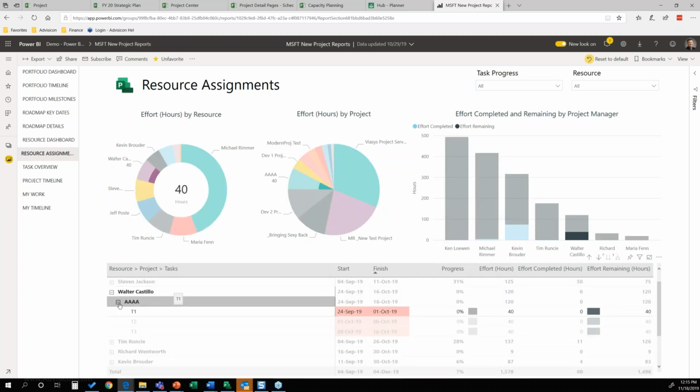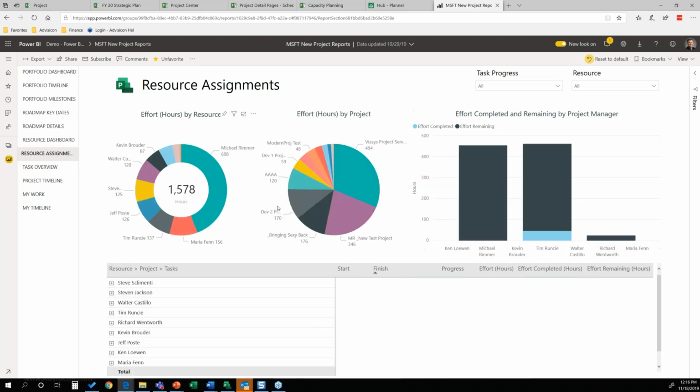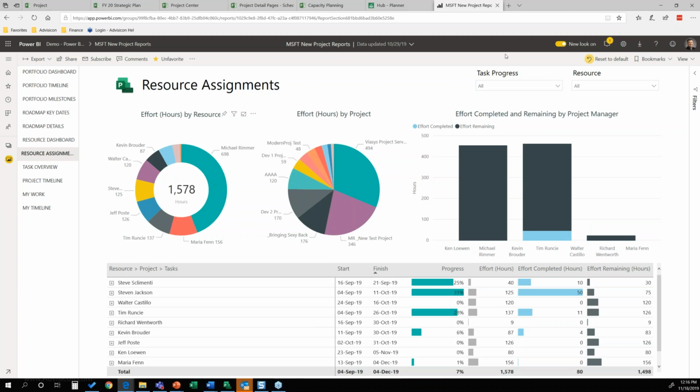So we've got a nice little grid here where you can use an outline format to basically centralize your work and your work details. And of course, using the interface of Power BI, you can connect, make them visible, show and hide different types of data, including even the nice little process here. Notice this: not started, in progress, completed. Very simple. So in progress is anything less than 100%, 100% would be completed, anything that has 0% is not started. Again, I also have the ability to apply filters based upon the resources that I'm adding.